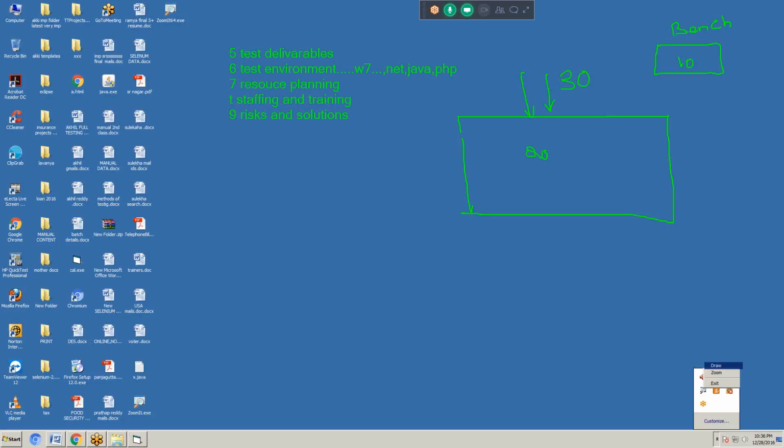So bench means extra employees. If anyone goes to another software company, they will keep someone in that person's place. So that is the bench. Each and every software company, yearly, every month, is paying some crores of rupees for bench employees. So what is the main risk? In the middle of the project, employees may leave the company. That is the risk. What is the solution? Each and every software company maintains the bench.